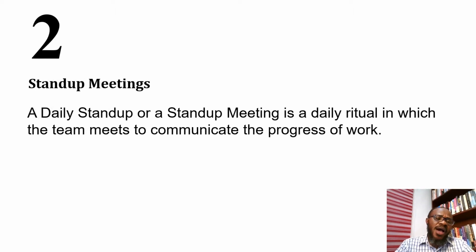The next thing we look at is called a stand-up meeting or a daily stand-up. Now, it is a daily ritual in which the team meets to communicate the progress of work. So like its name, stand-up meetings, the team members actually have the meeting standing, not sitting. And the discomfort of standing for a while is meant to discourage the meetings from prolonging beyond 15 minutes, because usually the maximum amount of time this meeting should take is just 15 minutes.